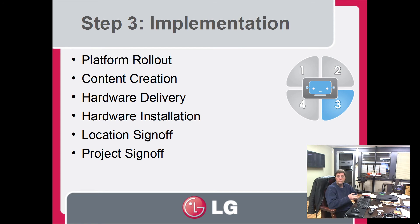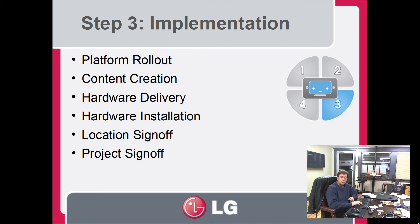The implementation is the platform rollout itself, content creation — you have to put something up on these screens when they first turn on. Hardware delivery, which is a big deal: you have a lot of different pieces of hardware going to disparate locations when you're doing a large-scale deployment. So with our partners, we have expertise in that. And then hardware installation itself, get it up on the wall. Once the networking is put in place and everything's running, location sign-off and then project sign-off.